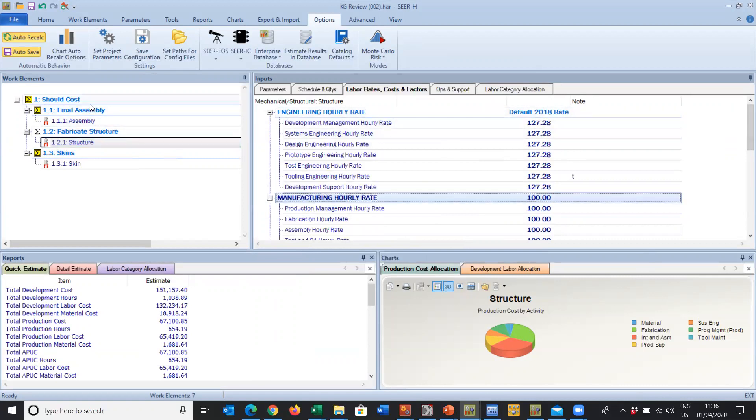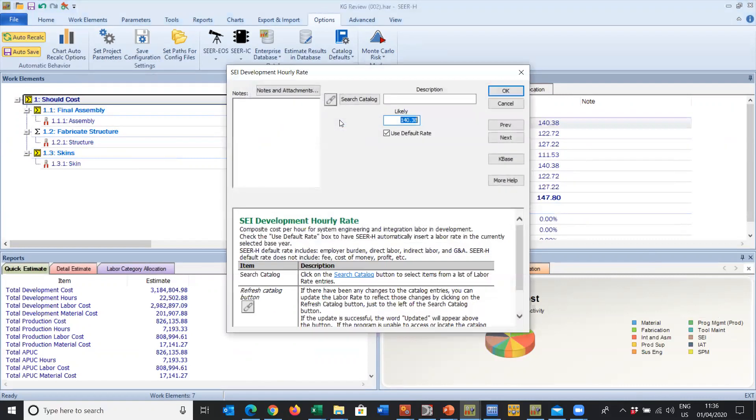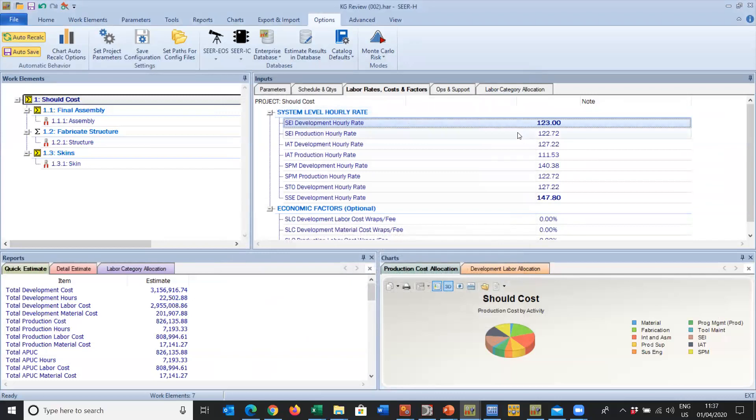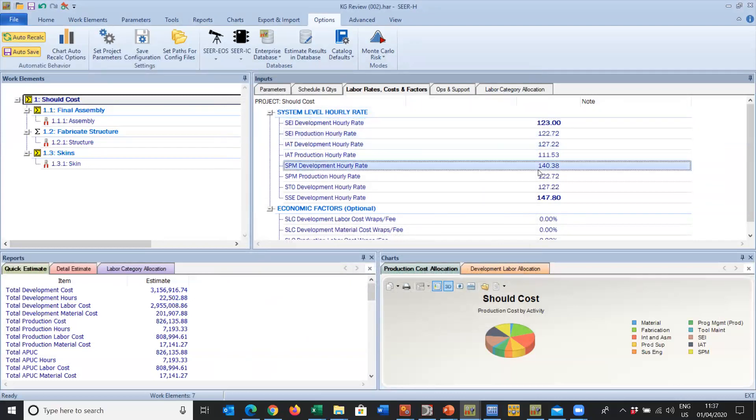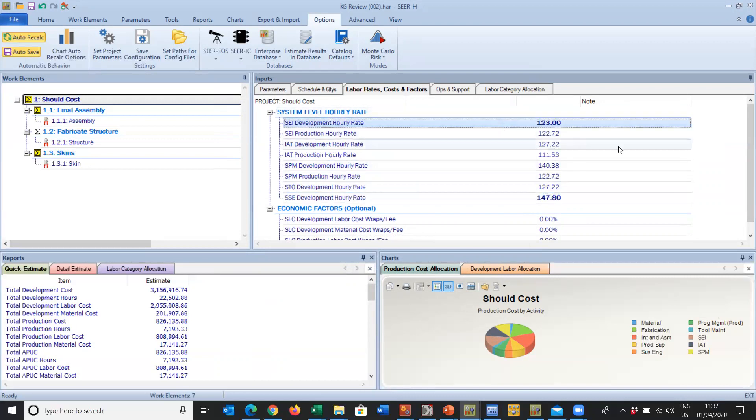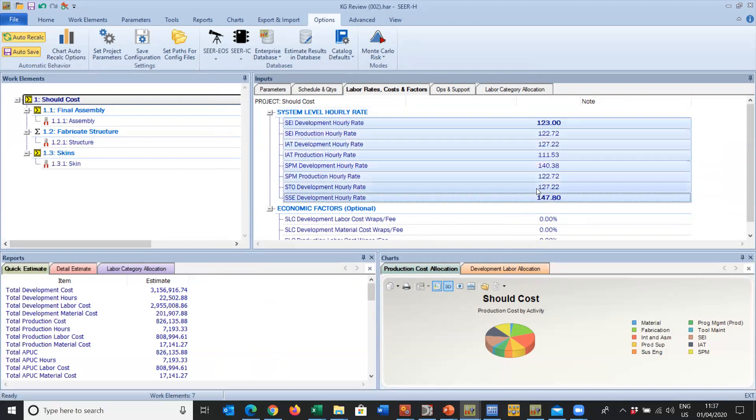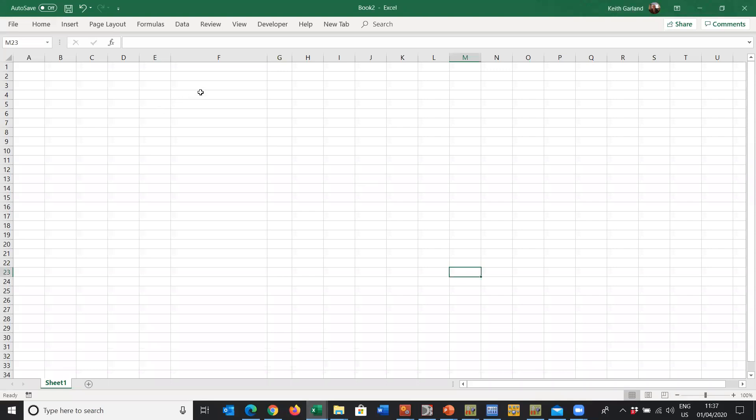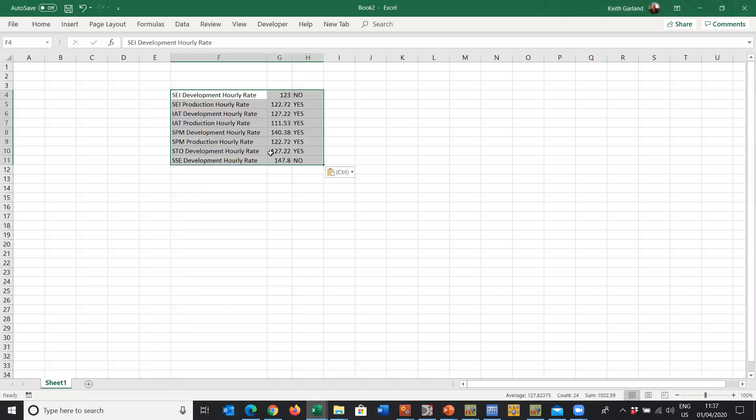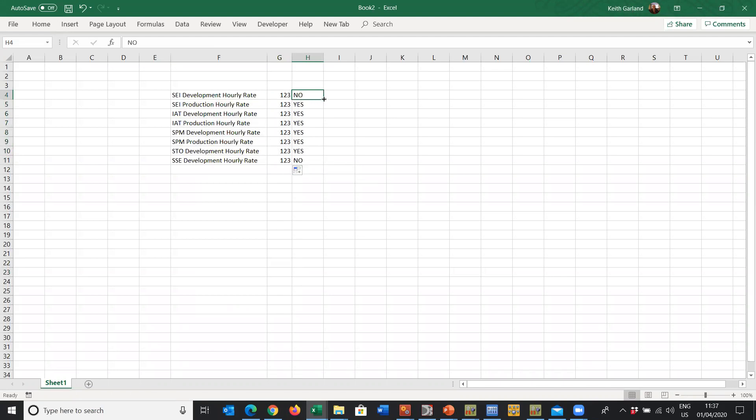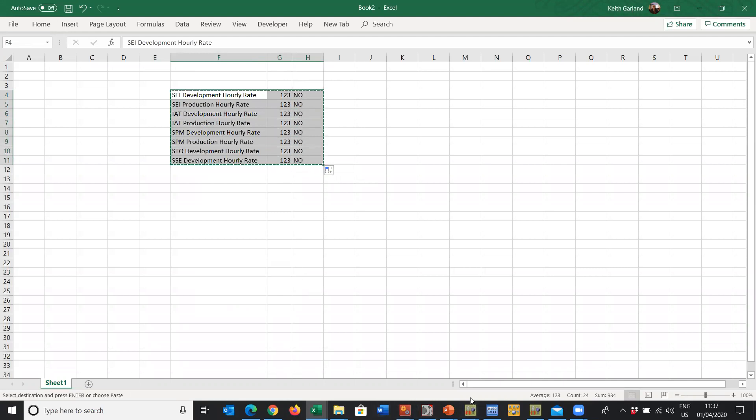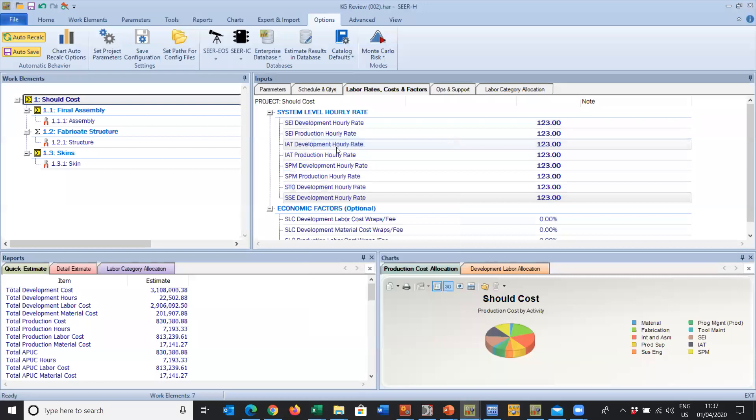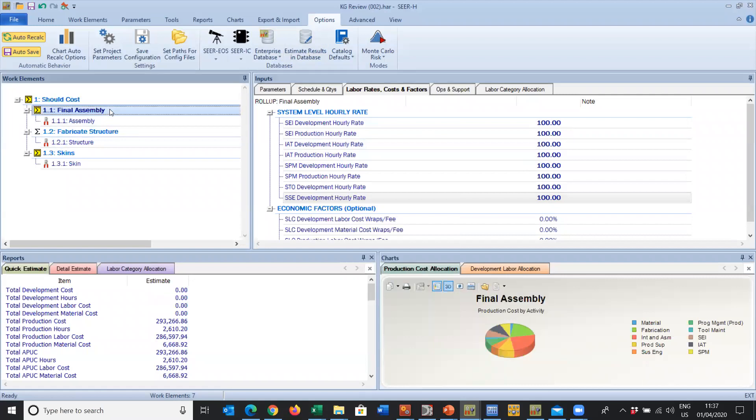When it comes to system level costs, changing the rates here, you have to go in and change them by double clicking, unchecking the default rate box, putting in my labor rate. It will change individually. Having to go through this, you think oh no, not another one, but you can in fact hold the Shift key down and copy the entire range, right click and copy, take this into an Excel workbook, right click and paste.